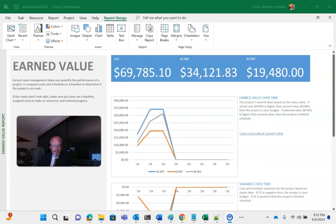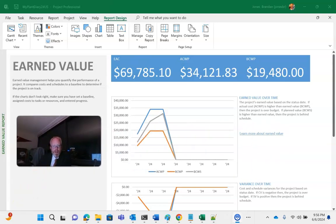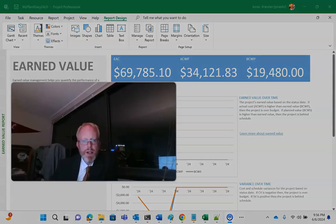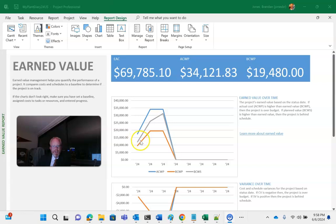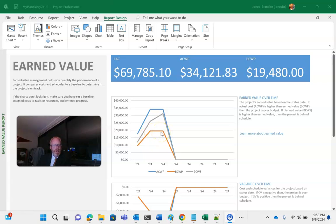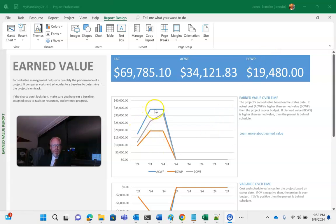Now let's take a look at our earned value report under costs. And this is going to tell us some important information. One note is that this uses some acronyms that are a little different from the acronyms that we use. So budgeted cost of work scheduled, or BCWS, is effectively the plan value. Budgeted cost of work performed is earned value. Actual cost of work performed is looking at the cost variance as well as the schedule variance. So budgeted cost of work scheduled, this gray line, is the progress we expected at this point in our project. Budgeted cost of work performed is the work we actually did. So you can see the gap between this gray line and the orange line is effectively how much we're behind schedule.